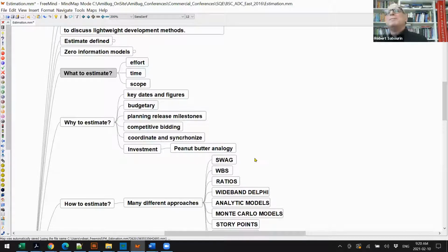So many testers forget about the issue of, hey, if the time and the effort are fixed, let's estimate the scope. And don't just estimate one scope, provide your stakeholders with a few alternatives. Here, there's choice A, choice B, choice C. And if you do that, the discussion, I've noticed, almost always becomes, should we do A, B, or C? And then they start saying, well, part of A, part of B, and they come up with a synthesis that's D, which is a little bit of A, B, and C combined.